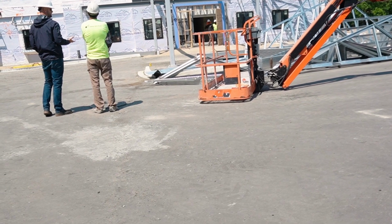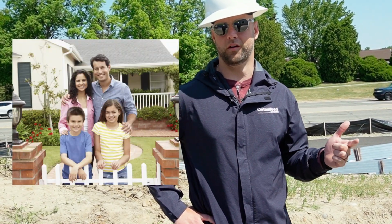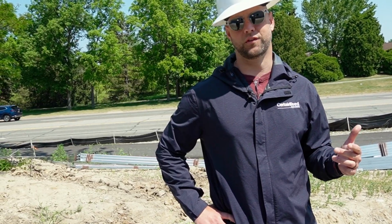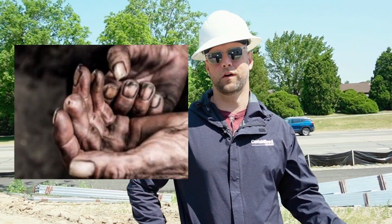So I'm going to give him a fair assessment and say, hey, you're looking at more like the end of next week, because I'm going to bust out 100 square a day in shingles. That means I'm only going to be here for 4 days if everything was done. He'll appreciate that over me just saying yes. There are different rules for every owner: building owners, homeowners, general contractors looking out for an owner. You've got to know them all, and the only way is to read your contracts and get experience. Get your feet wet, get dirty, mess it up once, learn from it.